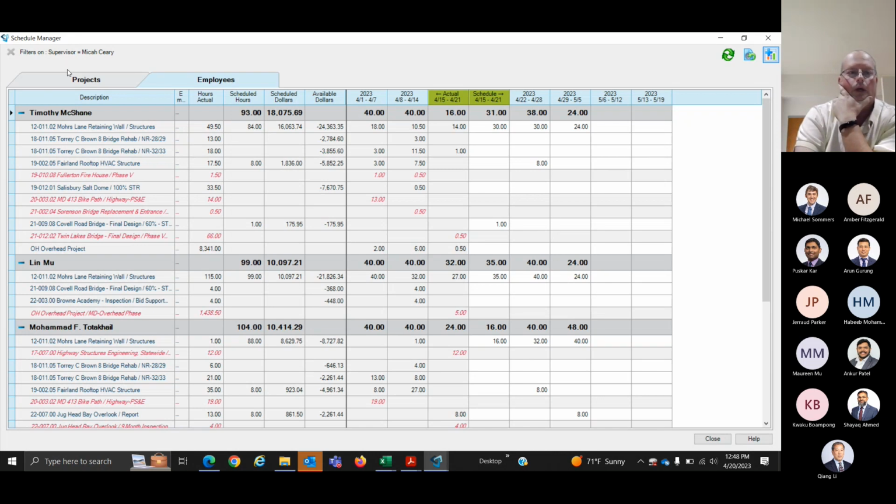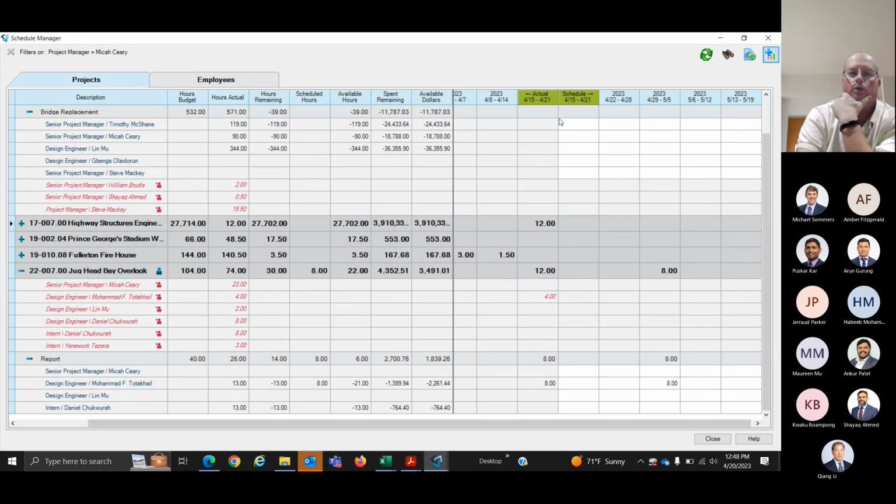And then from a project side, once you've programmed that all in, you can come in and see, okay, I can handle the hours that I've programmed in. It also gives you a hint, like here with the spent and remaining available dollars: okay, we had 2,700, I've programmed in 1,800. Is that enough to get done? That gives you a chance in advance, because you're programming this out 5 weeks or so, to know ahead of time you're running into budget troubles or whatever. Does that make sense?